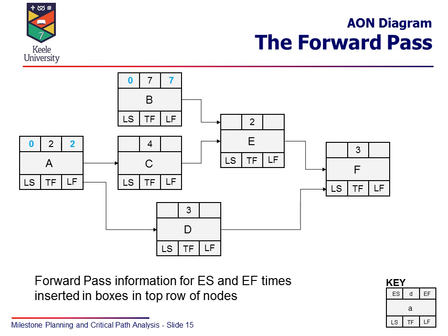Now we can now move those figures forward. So if we move forward to look at activity C, we can see that it can only start when A is finished. The earliest A can finish is on day 2, so the earliest C can start is on day 2. So I've put that figure in there now. It takes 6 days to complete, so the earliest activity C can finish is on day 6. And you carry on doing exactly the same, moving through the network. So activity D, earliest start is 2, earliest finish is 5.